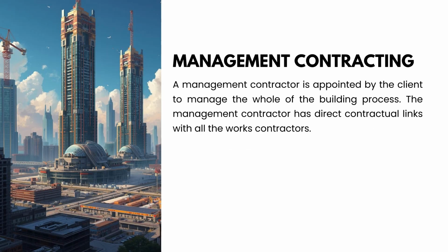Then we have management contracting. This may sound similar, but there's a key difference. In this case, the client appoints a management contractor. This management contractor then enters into contracts with the package contractors. So here, the contractual link is between the management contractor and the package contractors, not directly with the client. The management contractor manages and administers all the work packages to complete the project. So that is management contracting.